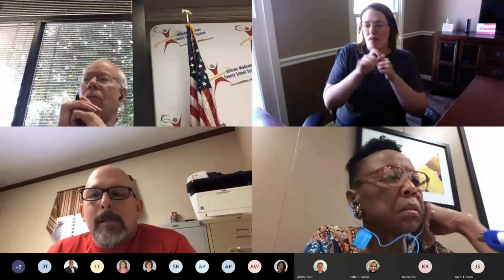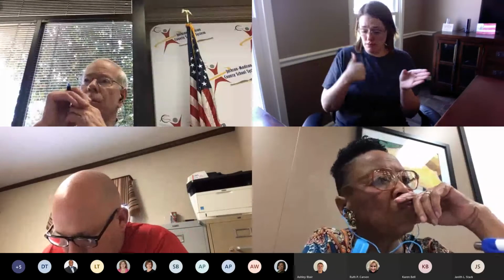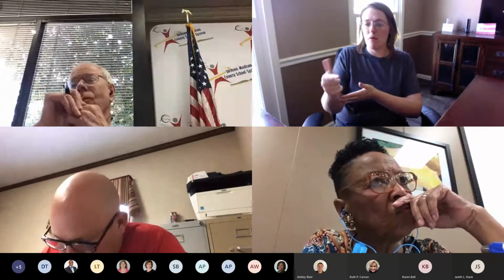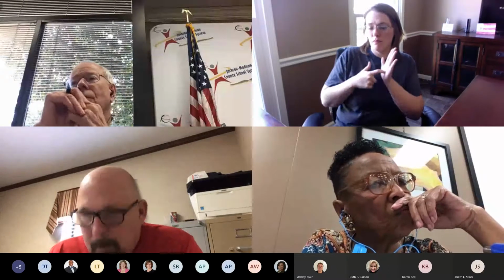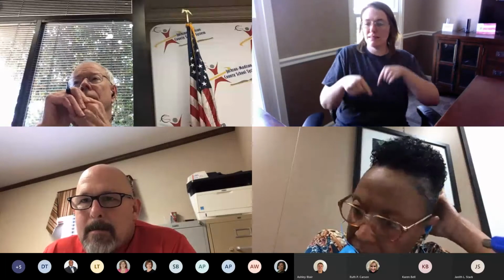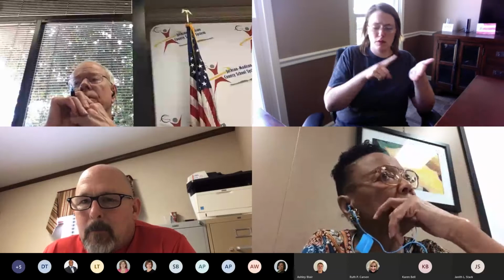There's a resolution that goes with this contract that I've prepared. The reason I prepared that resolution is that some bonding companies will require a resolution at some point, so I figured let's go ahead and get that resolution in place now instead of coming back later. That's pretty much the terms of the contract.